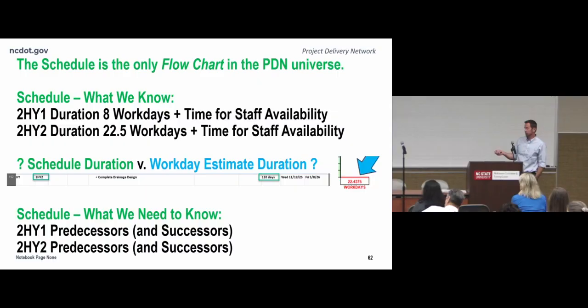Actually, the start date is set, I believe, if I'm thinking about this correctly. The start date is set, you enter duration, and then that sets your end date of your task. Each task, I skipped this part, is a line item in the schedule. That's a discrete task. Several subtasks roll up into a global task. Those global tasks are many times related to the SAP milestones that we are measured on.